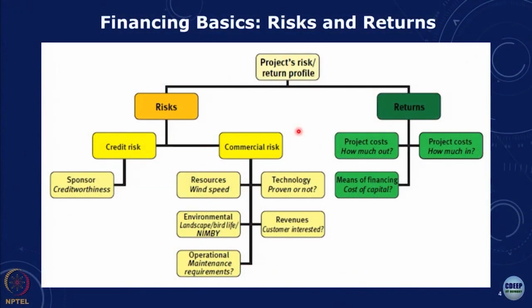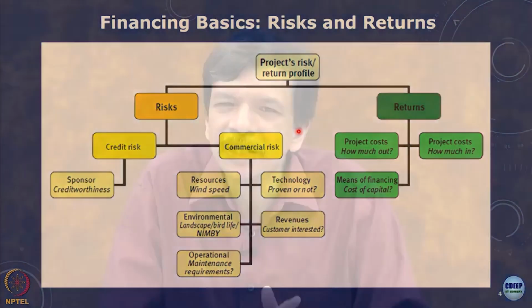And there could be environmental risks. For instance, if we think in terms of a large hydro project, or let's say a large nuclear project. For instance, there is this project with the VVERs with Russian technology in Kudankulam, and the problem has been that there has been strong local opposition, with the result that there have been delays, and this again carries a certain amount of risk.